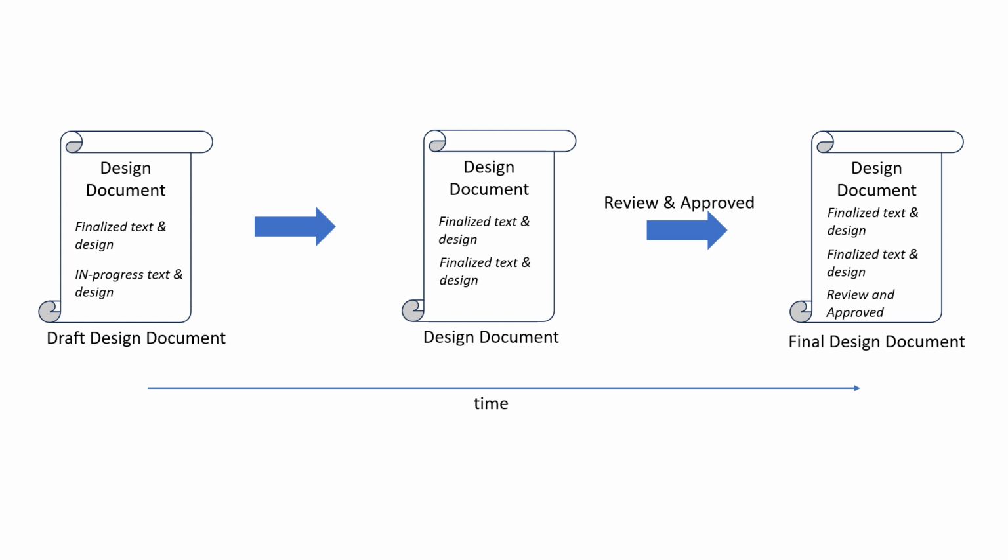The solution architect can start the initial draft of the design document, capturing necessary information and details early and adding more information when he or she gets sufficient clarity. The solution architect will share the draft design with the development team who can provide feedback. The solution architect can also present the document to stakeholders for feedback and review. A reviewed and approved design document from all relevant stakeholders is the final design document.